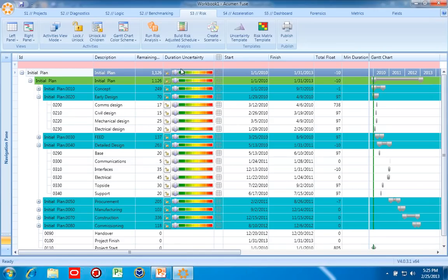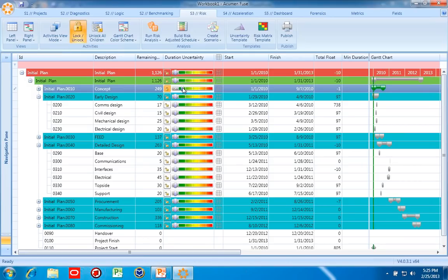They're certainly attractive. I can explain to someone very quickly that if they move this slider to the green area, they're telling the system that this activity has been estimated at a very conservative level. In fact, the activity may be able to be conducted in a shorter amount of time than originally estimated. Conservative, realistic. Now I go to the red side. This is where I'm telling the system this activity might have been planned a bit aggressively, and we need to factor that into the risk estimates. And finally, we can go to very aggressive.